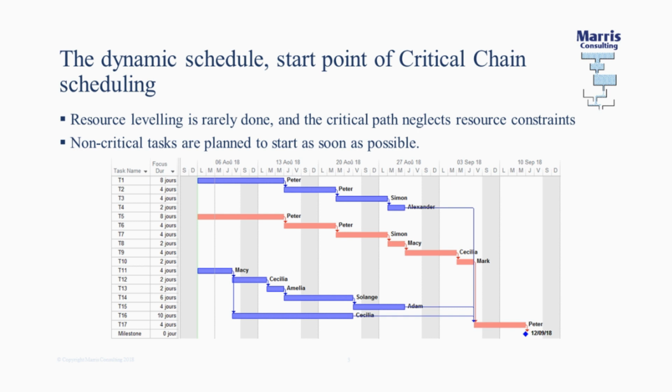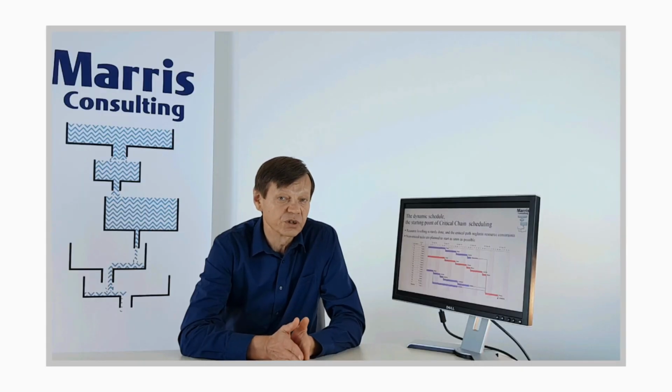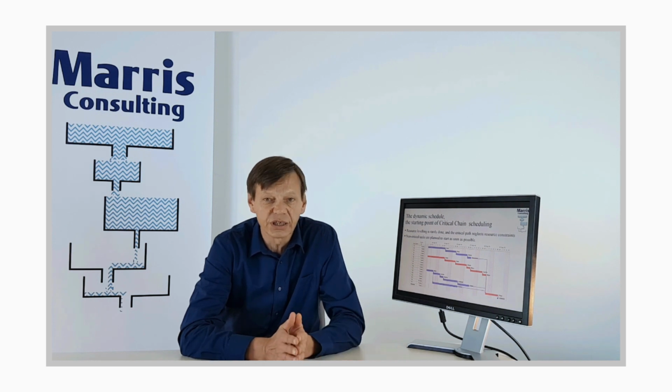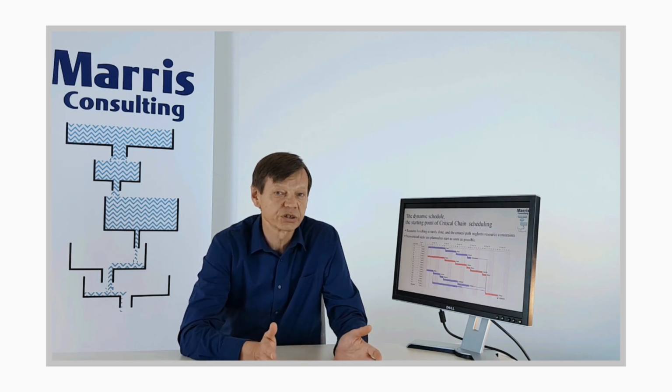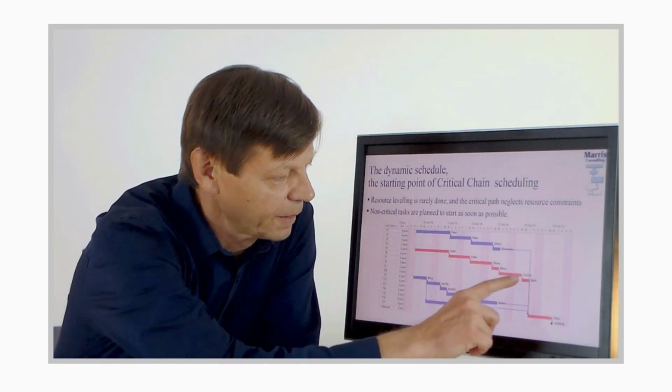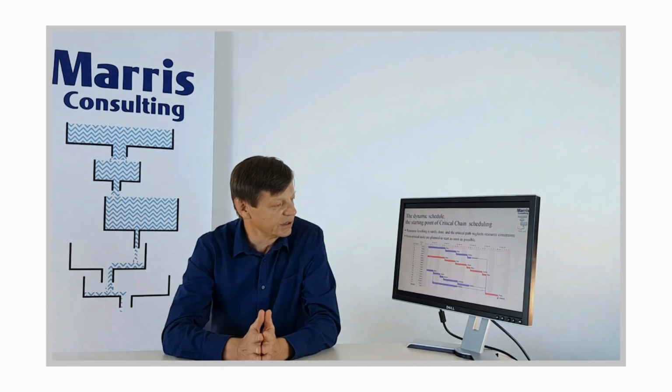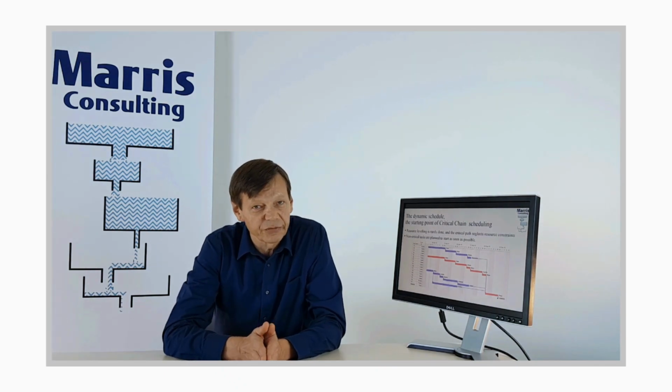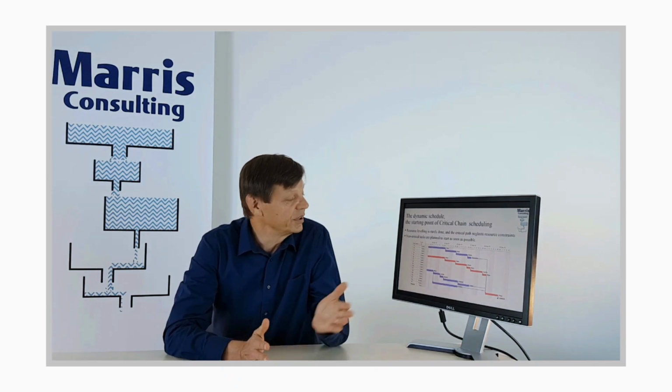And again, in a perfectly traditional manner, the first thing you probably ask yourself is, where is the critical path? The critical path is the sum of task durations, which when summed gives the longest duration, and therefore the project duration maybe. And this is presented in red here, okay? And that is the close cousin, but something quite different from the critical chain. This is the critical path.